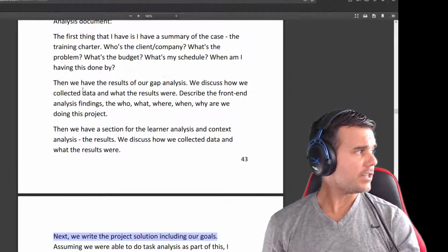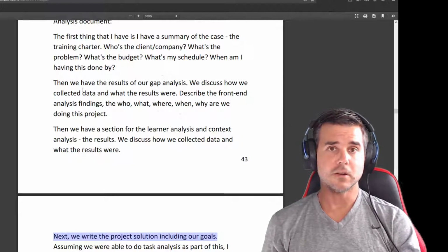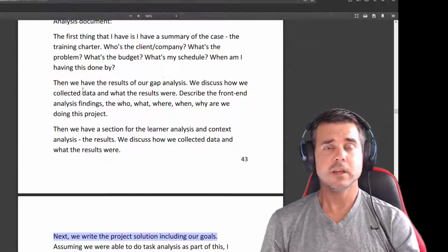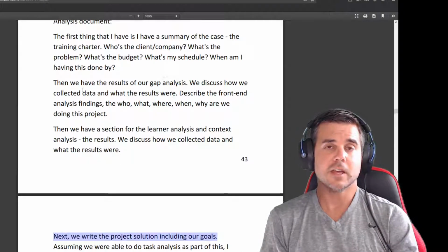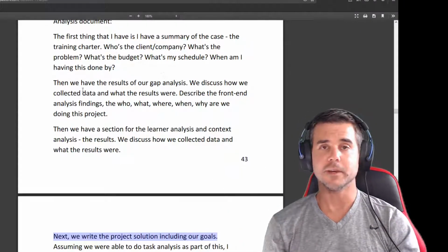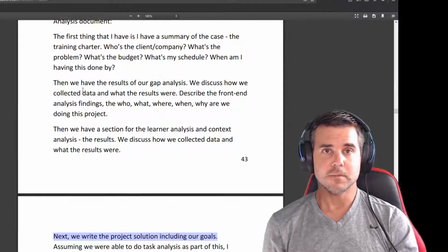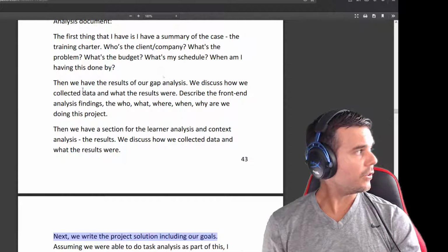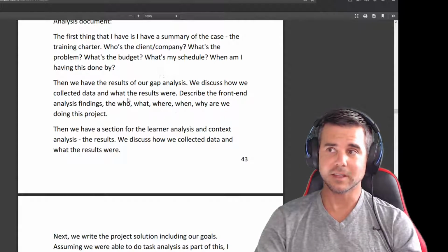I just personally do not like that fixed cost model. I'll tell them this is what I think it's going to cost you, but give or take a couple grand, depending on what happens. That helps me with scope creep. If they decide to add more stuff to the project as we go through, fine, it's going to take more hours and I'm going to charge more money. That's fine with me. The longer you want to take, I'll just keep making money from it. Stuff like that. So that's the basics of analysis. That's the end goal.